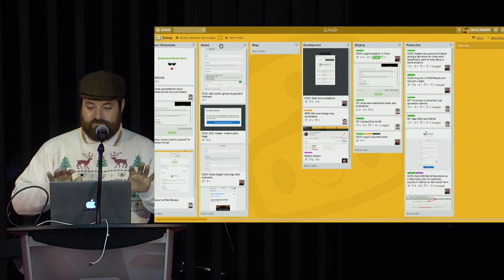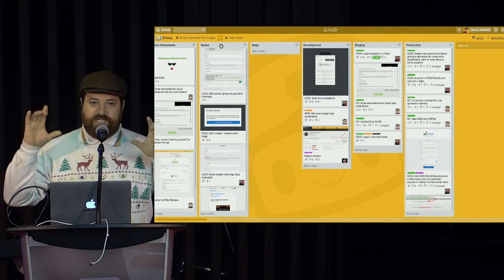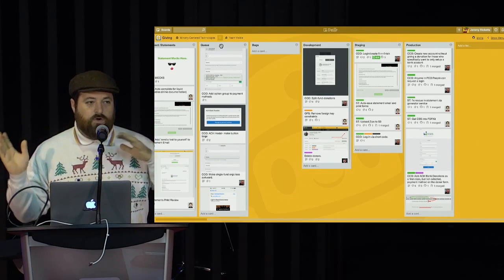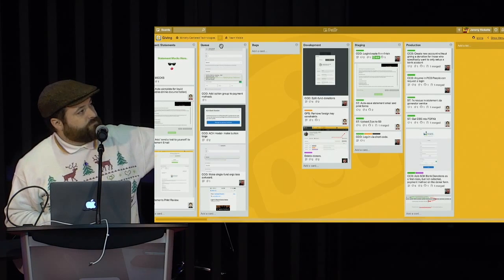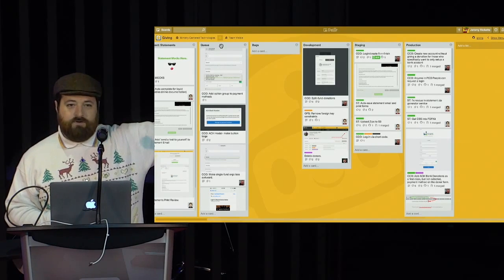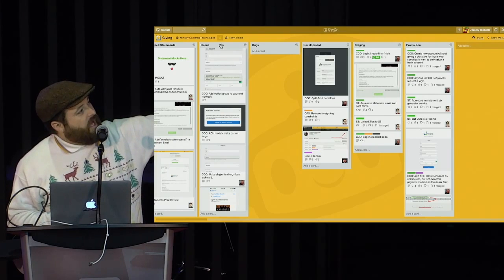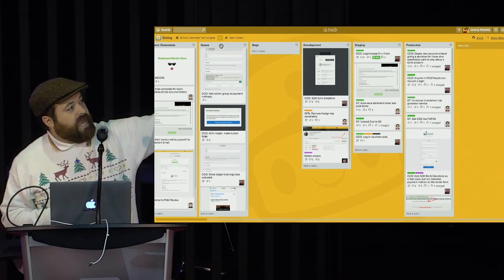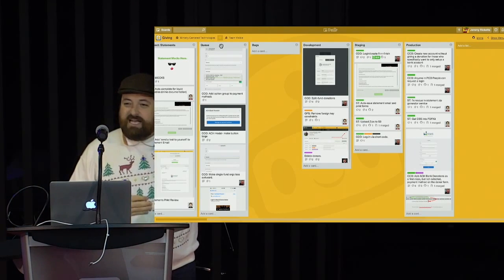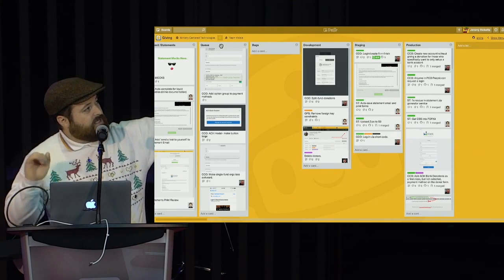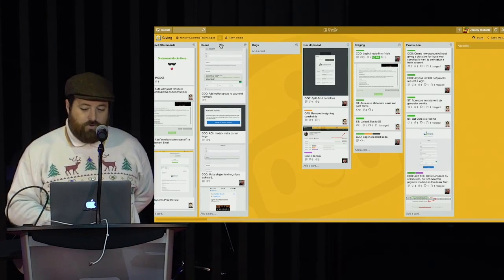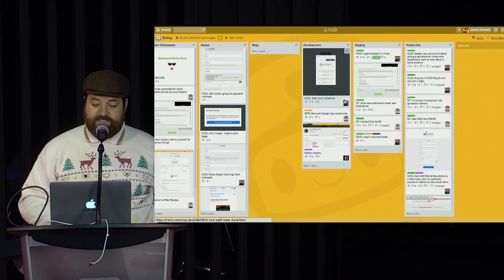These last 5 columns are your standard Kanban, your standard workflow for software development. You have things that you've prioritized in the queue, bugs, which hopefully you don't have a lot of. When things appear in bugs, they get added automatically for us through other integrations that we have, like Bugsnag and stuff. Also, we can get them automatically put in from Zendesk, which is our customer support. Things enter development, so I can see with the faces who's working on what.